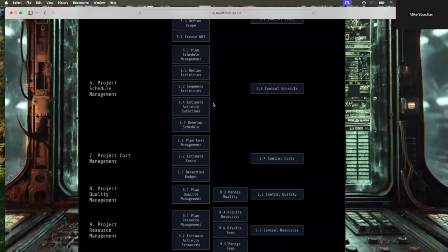But what isn't on there is the dependency determination. The dependency determination is the reason why I've scheduled it that way, and it is not on the diagram. That would be written down on the activity attribute.